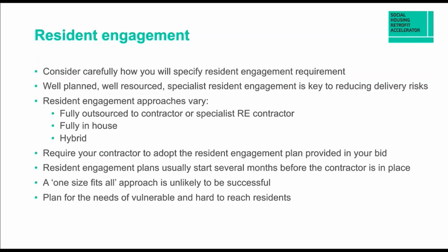Resident engagement plans should start several months before the contractor is in place, because you really need to understand if there are going to be refusals from residents. You might want to understand why that is and address that. You might want to change the property selection based on that.